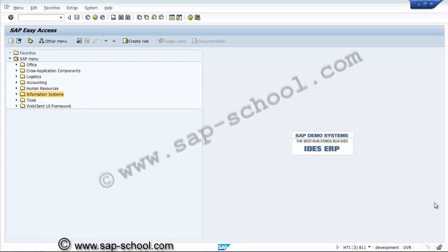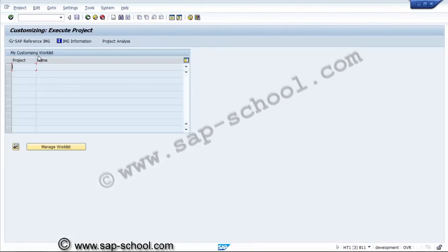After execution, now the closure of the project, period end closing. Before proceeding with the period closing, we'll check some prerequisite customized settings in the customizing guide, that is SPRO. In the customizing guide, we'll go to project systems. Here we need to check the settlement profile and allocation structure for the settlement profile.